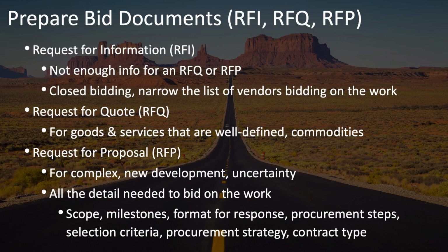Next, you'll usually put together either a request for quote or a request for proposal. A request for quote is more for goods and services that are very well defined and are more commodities. A request for proposal is best for more complex projects involving new development or more uncertainty, and a request for proposal needs to include all of the detail that's needed for the potential vendors to bid on this work.